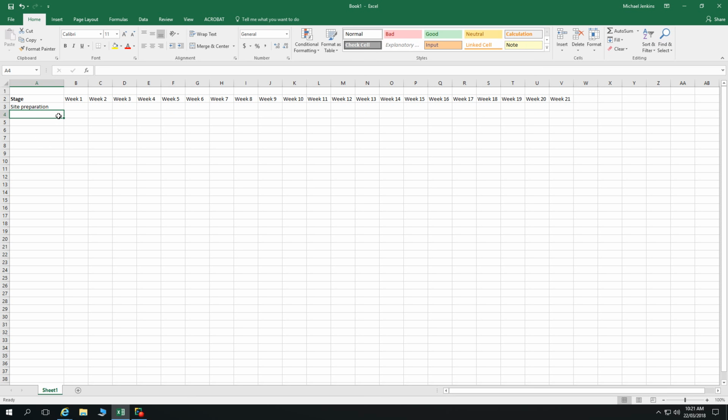And naturally, as follows. How long are we going to spend on our site preparation, do you think? A week? A full week? 4 days? I guess this stage is much easier to fill out by hand than it is by Excel. But what we can do in Excel is provide a shading to a cell like that. So we can go, alright, 1 week. For illustrative purposes, that's very simple. When you're doing this by hand or where you employ multiple columns for each week, you can shade sections and be a bit more specific down to the days. We can do that, but it would take much longer throughout the lecture, so we won't be doing that today. So we can punch in a week like that.